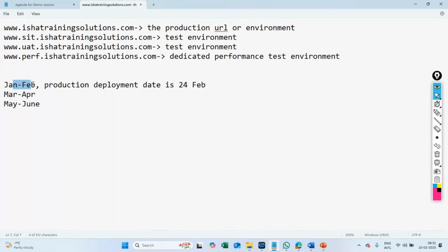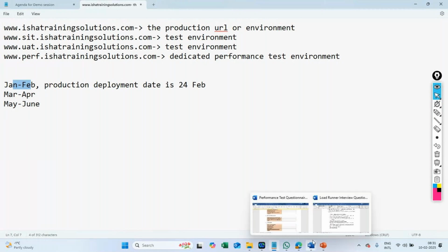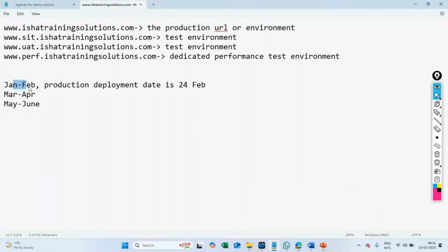Also, once the release is started, once they have some progress, once they give something to manual testing for testing purpose, then quickly schedule a call and ask them. So you might call them around January 15th or sometime, and then if they say they need some time, you can follow up and check with them by January 20. That means by end of January, third week or fourth week, you should know exactly what you have to do.